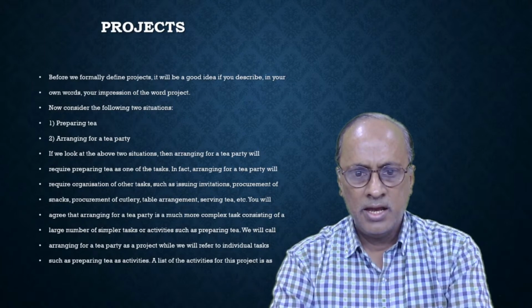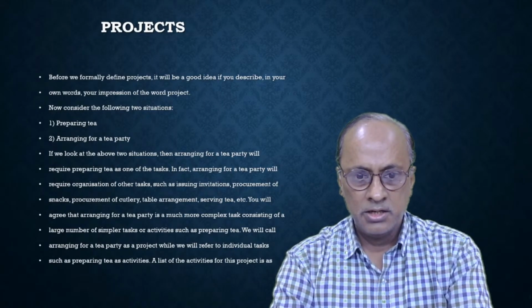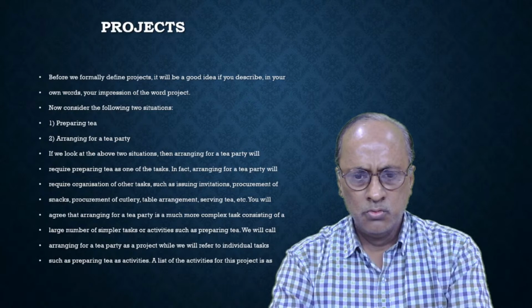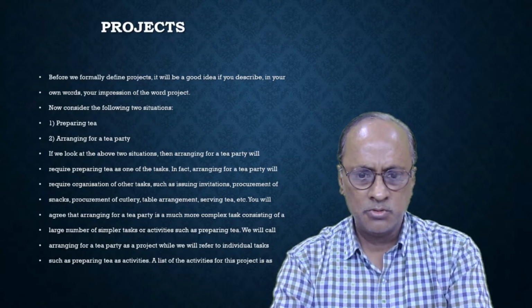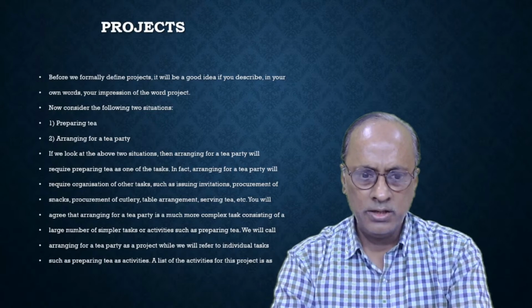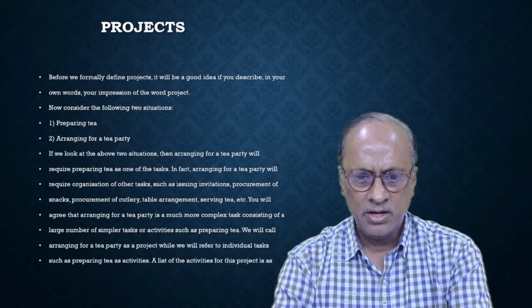In fact, arranging for a tea party will require organization of other tasks such as issuing invitations, procurement of snacks, procurement of cutlery, table arrangement, serving tea, etc. You will agree that arranging for a tea party is a much more complex task consisting of a large number of simpler tasks or activities such as preparing tea. We will call arranging for a tea party a project, while we refer to individual tasks such as preparing tea as activities, and the list of all these activities for this project.